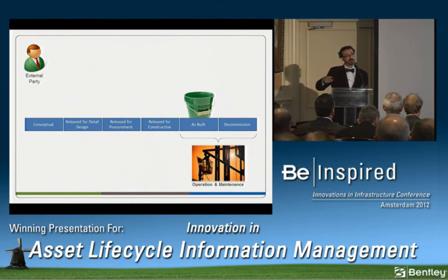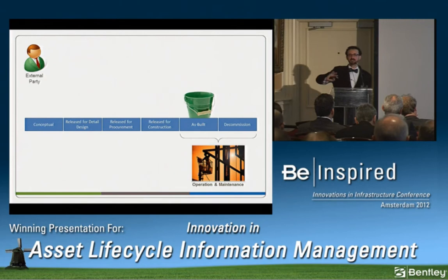The owner-operator, the facility itself, when they need information for operations and maintenance, typically they have to scrape information off of drawings for assets, even just tagging. They don't receive comprehensive lists. And when it comes to the engineering data, they might be able to find a spreadsheet. They might be able to squeeze something out of the external partner to help them line up the engineering data to the asset, but we really have no idea. And typically when I've spoken about data, even internally with Southern Company, often I hear, we'll just wait till the end of the project. We'll just wait till the end of the project.